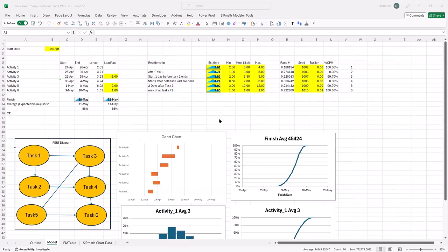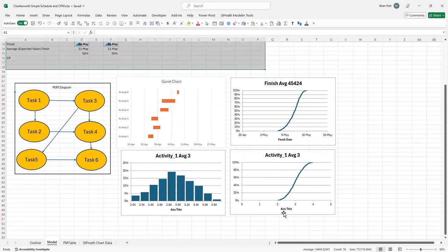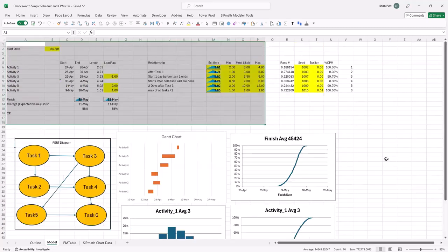and then sampled these from this distribution, and then use these random numbers and this time to come up with the length of the activity, and put a start date and an end date. Okay. And so if I think about activity 1 with this distribution, it looks like this. It goes from 2 to 4 and is somewhat symmetrical around 3. Well, I guess it is symmetrical around 3.